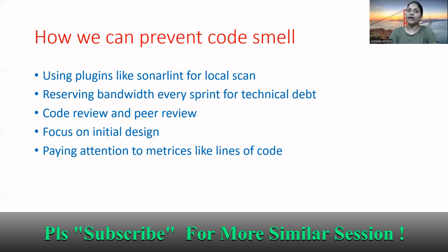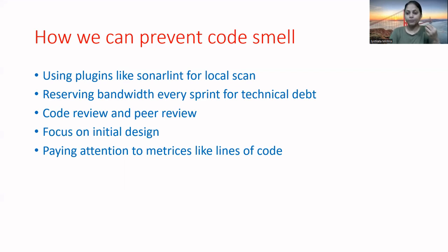Finally, it is found that the chances of introducing code smell during the initial phase of code development are higher. That's why it is recommended to have spikes in the sprint, and to pay attention to the designs. Pay a lot of attention, get those designs reviewed. Should we use Couchbase, should we use Postgres? All these things you need to discuss initially, study their pros and cons, and then go with the actual implementation or coding.